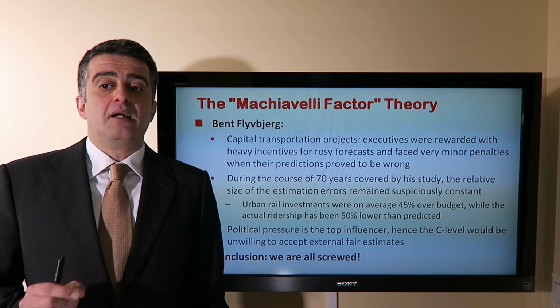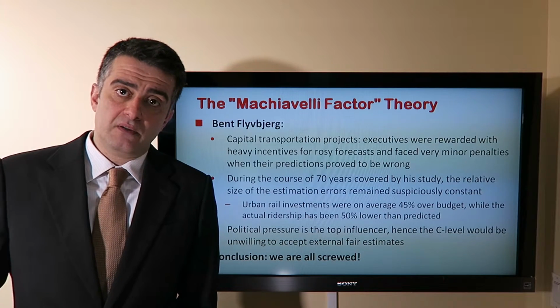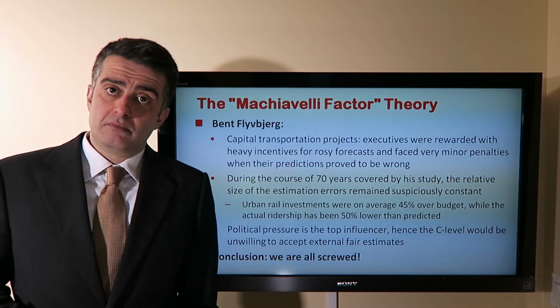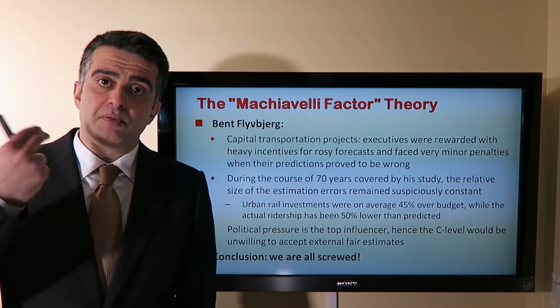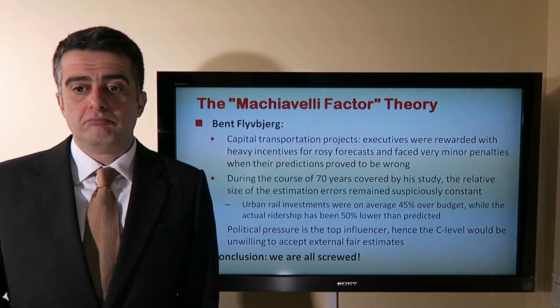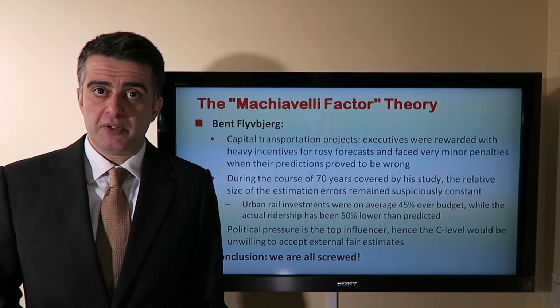And they claim that political pressure is the top influencer, hence even if you hire an external estimator, executives will still be unwilling to accept his results, and they will pressure the independent estimator to provide them with the results that they want to see, or with the estimates that they want to see. Conclusion from that, well, we're all screwed and not much can be done about it.